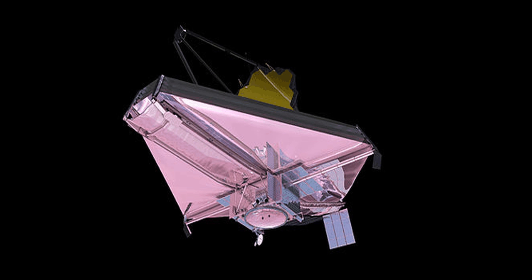In March 2008, the project successfully completed its preliminary design review. In April 2008, the project passed the non-advocate review. Other past reviews include the Integrated Science Instrument Module review in March 2009, the Optical Telescope Element review completed in October 2009, and the Sun's Healed review completed in January 2010. In April 2010, the telescope passed the technical portion of its mission-critical design review. Passing the MCDR signified the integrated observatory can meet all science and engineering requirements for its mission. The MCDR encompassed all previous design reviews.